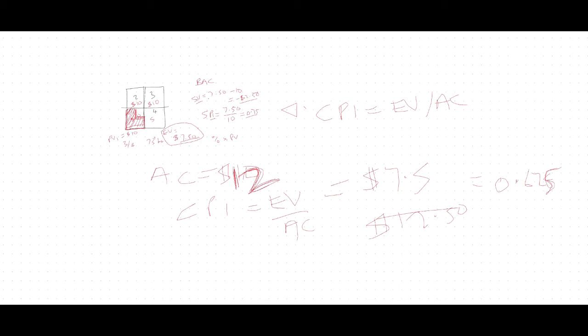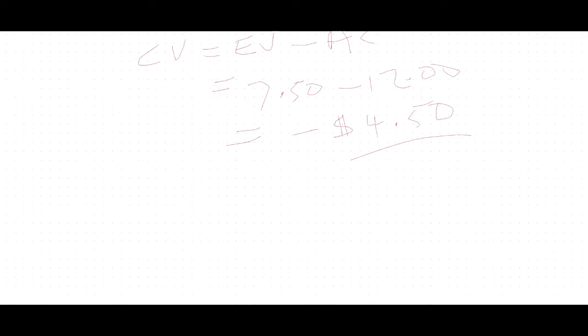For chapter 19, the most important thing is understanding the dynamics, the process of cost management. For cost management, we first of all plan cost management. How are we going to manage cost? Then we estimate the cost by finding out how much each activity will take. Then number 3, we determine budget.